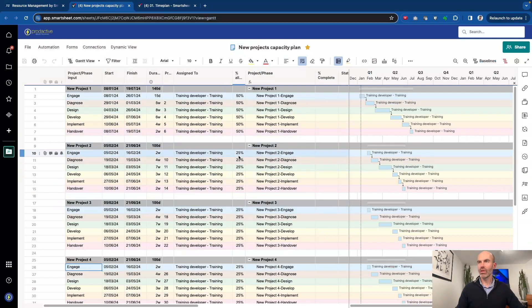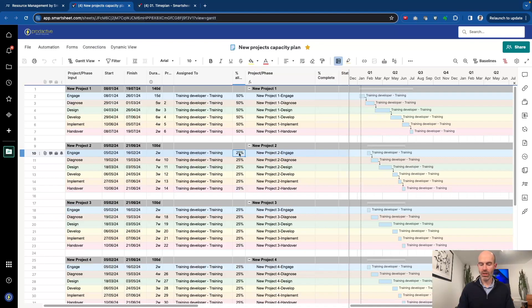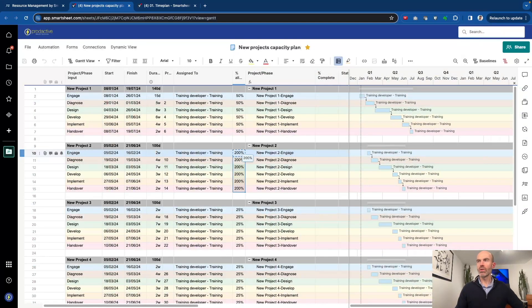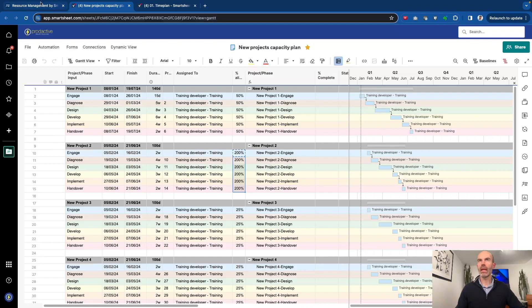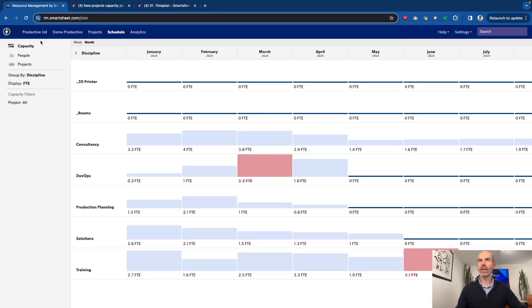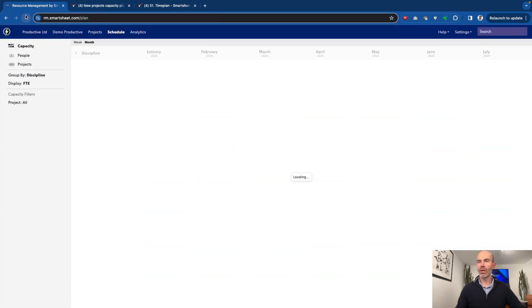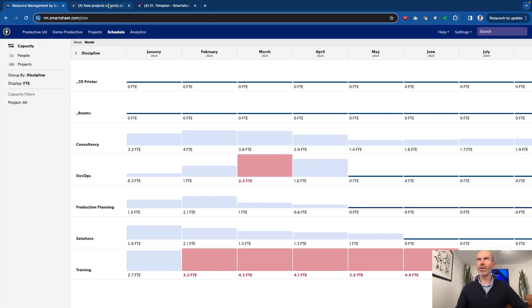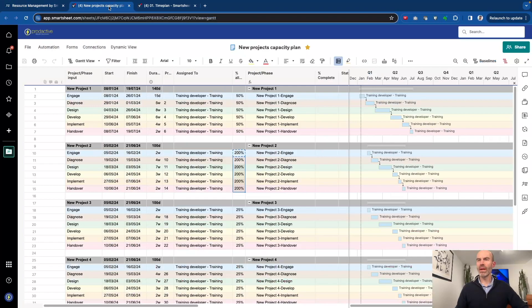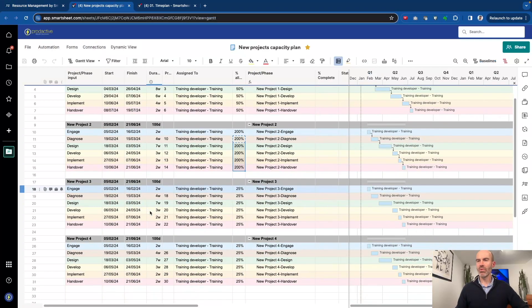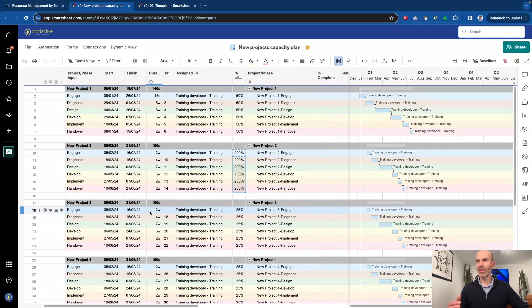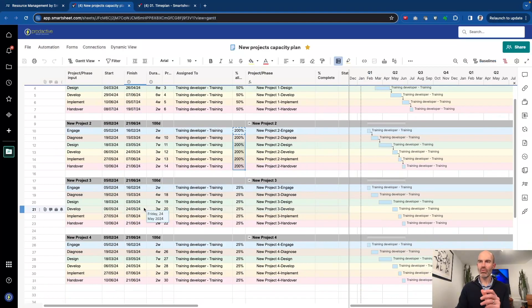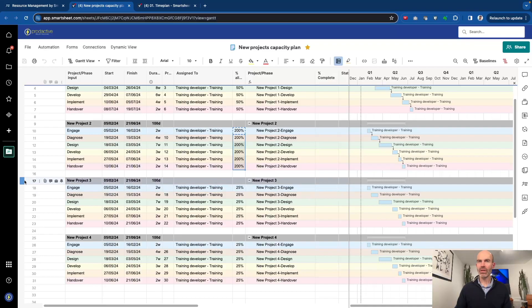If, for example, this project required two resources, I'm going to put 200% in this case and just crank it up across the lifecycle. If I just go in, training is now at capacity. We've got a way of being able to have this as a project and start seeing this as a way of scenario planning. Because you're not setting up individual projects each time, it's very easy to take these out again.